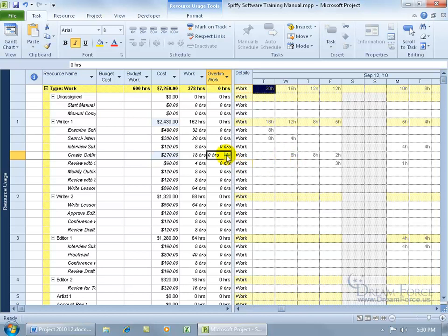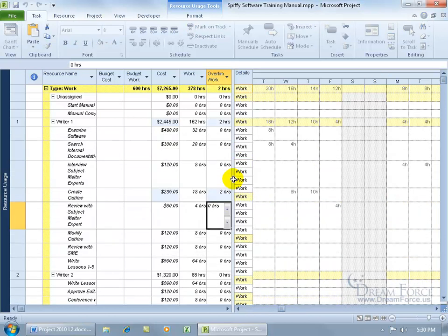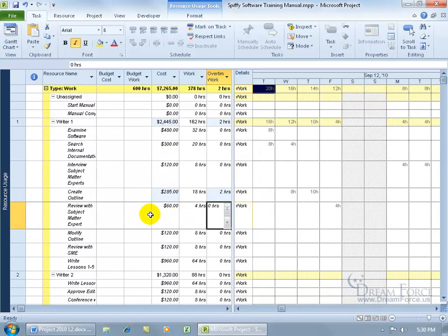Close enough. You can see over here there's the 2 hours, increase it for the overtime, hit enter, and there we go, it updates it, and of course my project will do this to me from time to time. Text wrapping, so it expands these rows here, but that's okay, it's not messing with the overtime that I entered in, so it brought the 2 hours, again, as you saw in the previous view, over to Thursday because of project schedule and budget calculations. And like I said, you can go ahead and enter in your actuals and say it's 9 hours that day, 9 hours the next day.